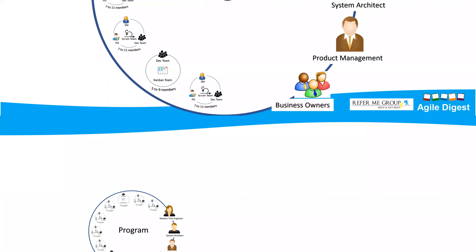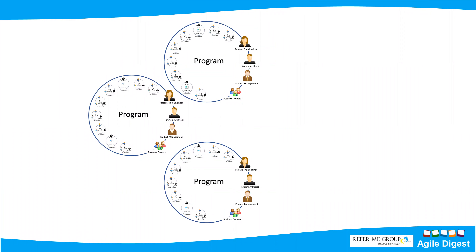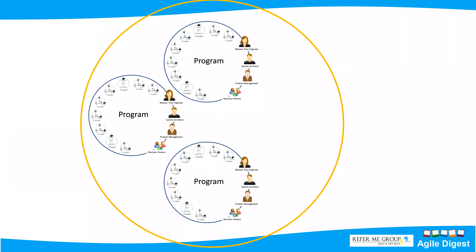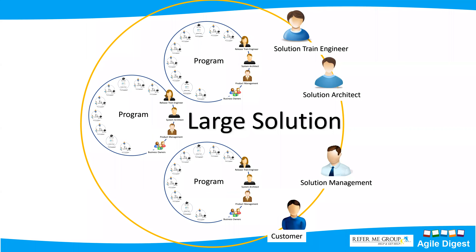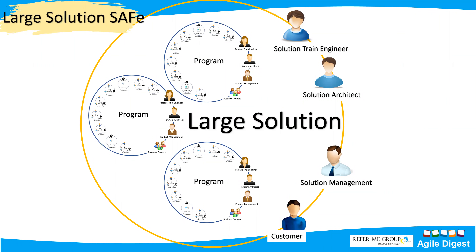All those combined make one program. Multiple teams can work on Kanban, some on Scrum, and all teams are governed by the Release Train Engineer, System Architect, Product Manager, and Business Owner. In the scaled agile framework, this structure is called Essential SAFe. If you are not having multiple teams making one program, you are not using SAFe. Now if we have multiple programs, in a large organization that's possible — we make them into one boundary called Large Solution, with roles like Solution Train Engineer, Solution Architect, Solution Management, and Customer.